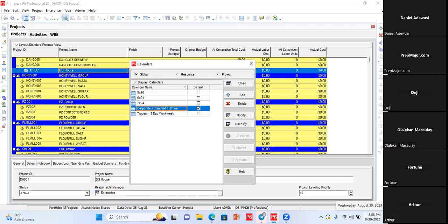And I will demonstrate all this to you, and you will see. If I'm working on a particular project, and once it's created I say, okay, this calendar is specific, we are only working on Third Milan Bridge Monday to Wednesday. That's our working calendar. Every other day, we don't work. That calendar is specific to that project. Any questions so far?